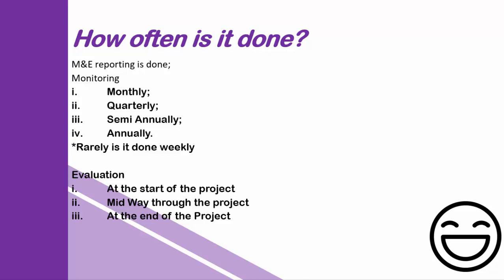So for purposes of aggregation, notice here it's done monthly, but you may choose to generate the report quarterly, for purposes of proper aggregation. Or you may choose to aggregate the data semi-annually or annually. But whatever the case, it's really dependent on the resources you have as an organization.